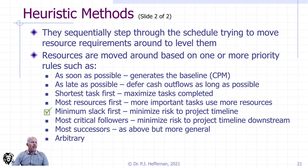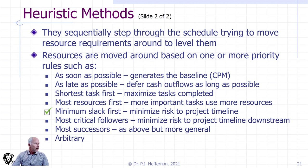Shortest task first would maximize the number of tasks completed — depending on the value of the task versus the quantum of material delivered, that may or may not be of value to you. Most resources first — the implication is that where something has a lot of resources implicated, it is normally the most important, allowing us to prioritize by quantum of resources. One of the ones I like the most is minimum slack first, which gives priority to your critical path, and outside of the critical path, you start looking at non-critical activities that have the least breathing room — take those first, and those with the greatest breathing room we allow to slide a little bit, hopefully still within their slack. This one seems to have a fairly great following and the logic is fairly obvious.